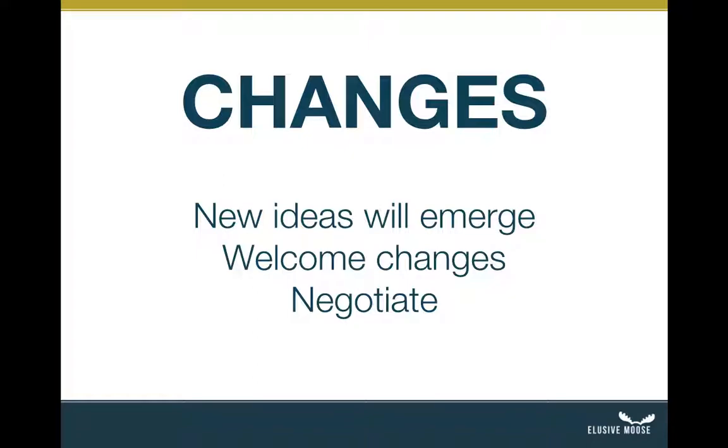If a new idea comes in, we're going to put that idea on what's called an enhancements list. You can call it whatever you want. I like the word enhancements because it's positive. This is something that will enhance your software. And I'm going to track those additional features that aren't represented in my feature list. And when I track those things, we're going to do one of three things with them.